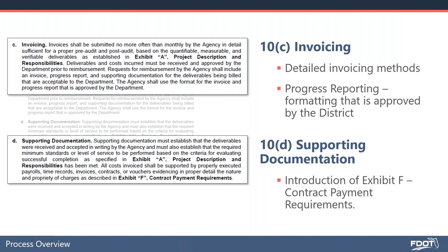With regards to supporting documentation, while we are not going to be reviewing the expense documentation or the supporting documentation with every invoice that you submit, please be aware that we at the district are subject to audits, and we will be pulling a percentage of invoices and periodically reviewing the backup documentation for eligible costs and for consistency with regards to the expenses incurred in that period and what was reimbursed under that invoice.